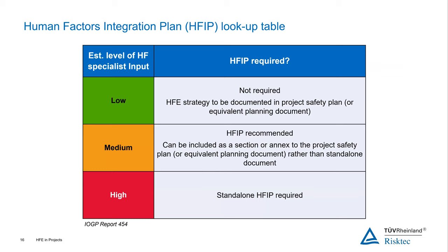And this other lookup then asks us, do we need a specific human factors plan to be written? And so if our level of input is low and we are saying that what we're effectively doing is applying standards, and we're not doing any specific studies, we're just going to apply the standards. If we have an issue, we may seek some advice on it. Then potentially you're not going to need a separate human factors plan.